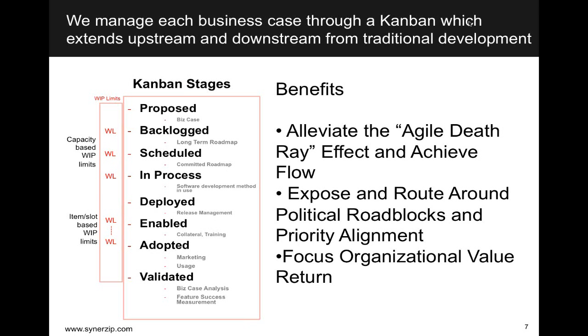Then the next phase in this proposed Kanban is all around enablement. This is the collateral and training that's required to really take advantage of those features. Some interesting sequencing discussions here, and you read a lot about this in the literature surrounding lean startups. But even if you aren't practicing lean startup practices around development and operations, there's still a significant amount of value to be had from the ability to decouple the deployment of features from the release of features.